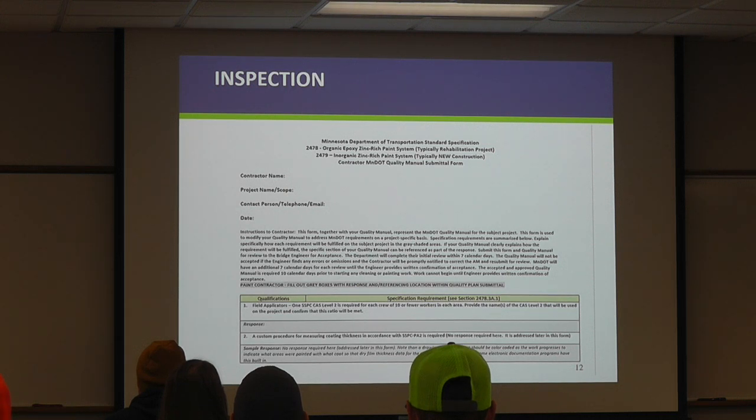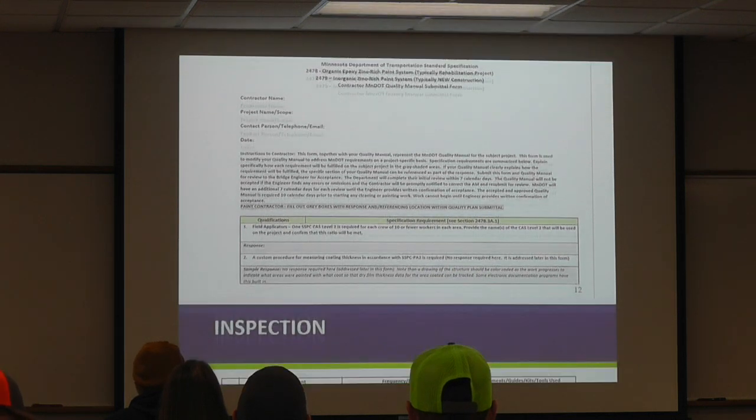But they will state how many measurements, what square foot area, any information you need to know if it's going to be a multi-step process. All the information can go right into this document. That way, no matter who shows up from your office, if you aren't able to make it one day and somebody has to sub for you, all they have to do is refer to this. It's spelled out for them in black and white.